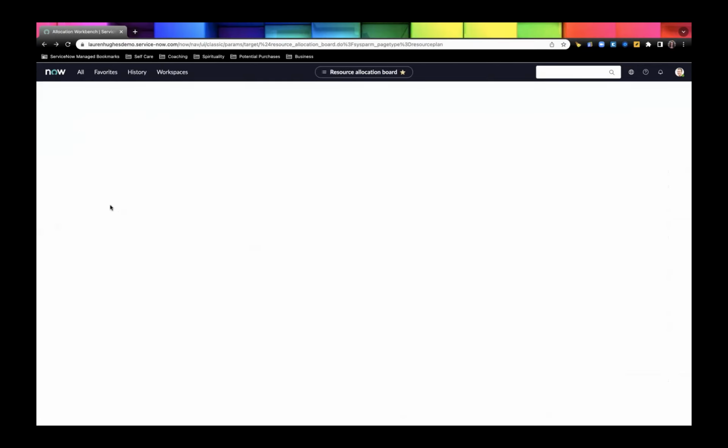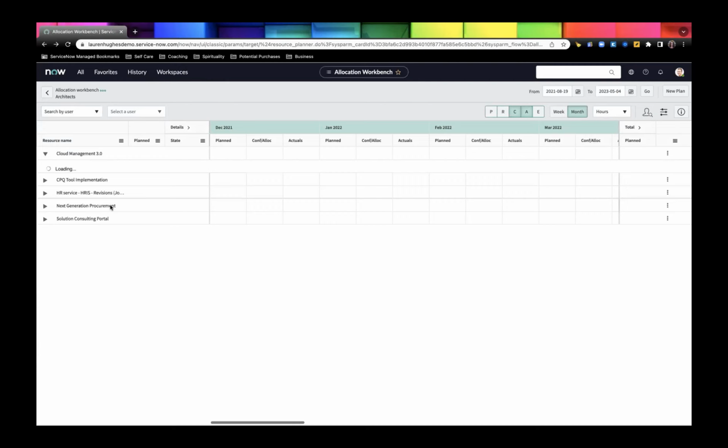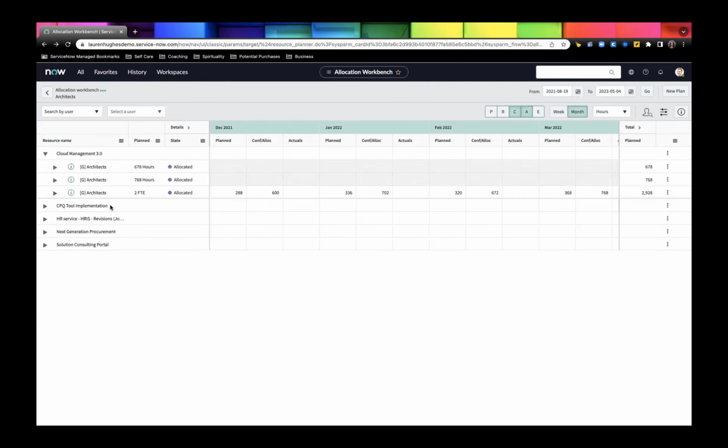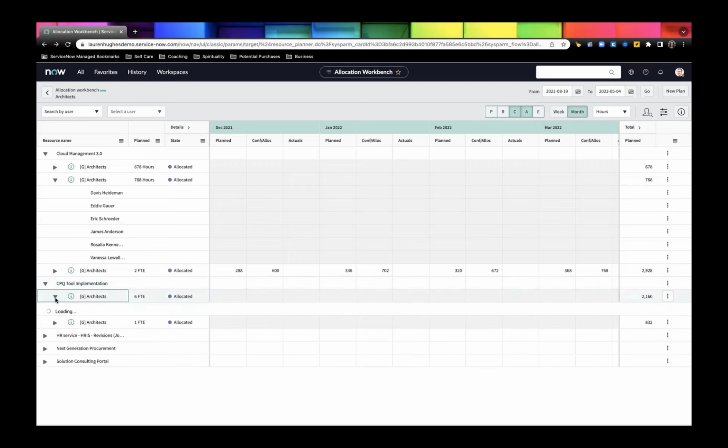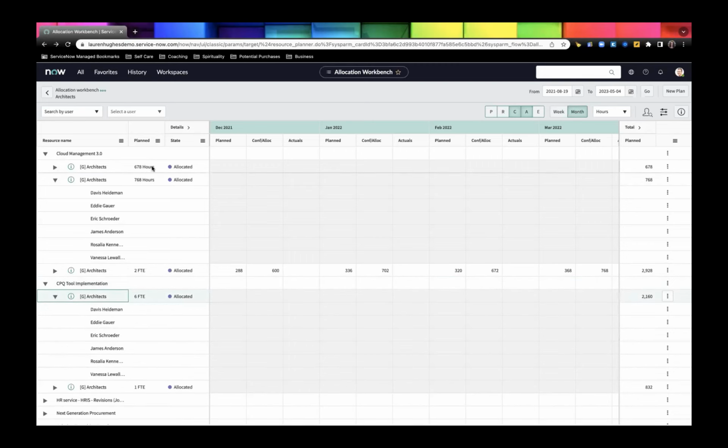Yeah, there are other views you can look at other than the resource allocation board to see an individual's workload and what tasks they're assigned to and stuff. This is more just leveling resources across organizational groups in my group and how they're assigned and things like that. And we see that we have the hours versus full-time employee, whatever your system setting is for full-time employee, which is usually 8 hours a day, 5 days a week or whatnot. We don't have to actually track hours at that point, though. They're just going to say that this person's allocated fully across that time span.